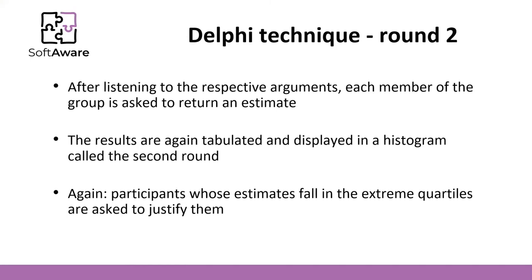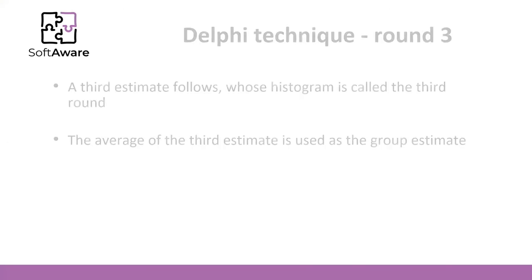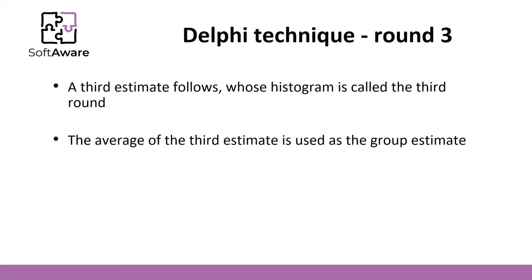Then we start round two. After listening to the respective arguments, each member is asked again for a new estimation. Results are again tabulated and displayed, and those in the extreme quartiles again justify their estimates. In round three, a third estimation follows. The average of only the third-round estimates is used as the group's final estimation.